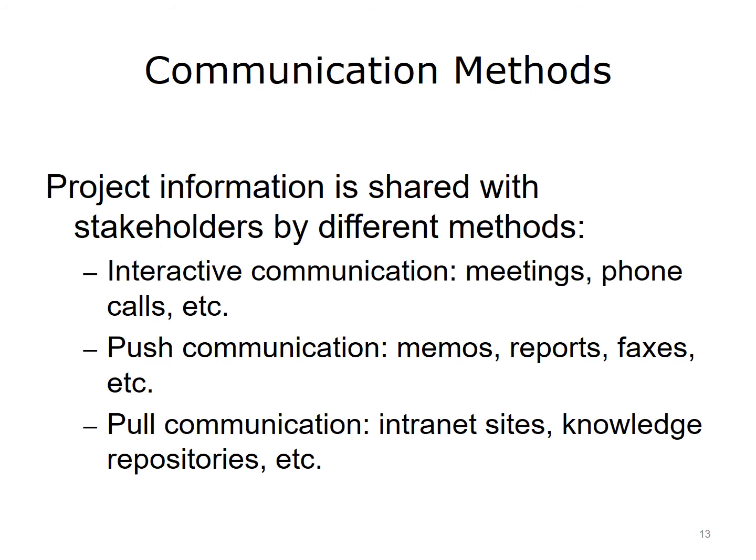A project communication plan must define effective communication methods and determine which ones are most effective for specific components of the project. There are several categories of communication methods. Interactive communication typically consists of real-time meetings, phone calls, video, or web conferences. This is the most engaging form of communication and allows the communicator to immediately judge the response to a message. It also allows for immediate dialogue and decision-making.